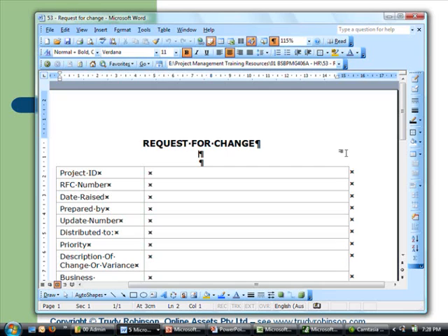So it might impact the timeline, it might impact what you're going to do, or it might impact the actual budget, or whatever it may be. So what you're going to do then is ask permission from the people who signed off the scope and signed off all the project plan for change. So you say, okay, look, these things have happened, and so this is why we need to recognise now that we're going to change direction or do something a bit different.